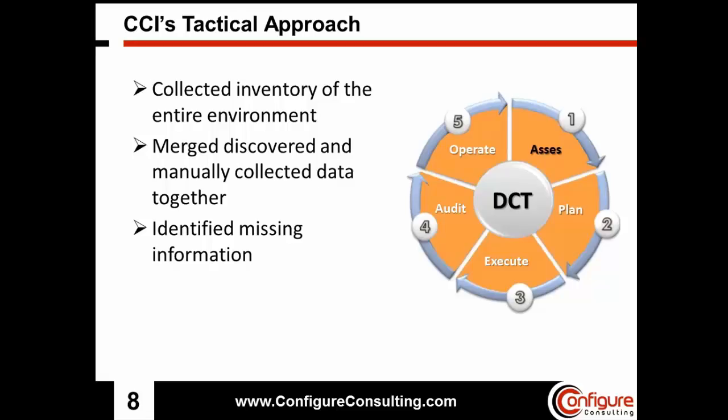So I mentioned at the beginning that they originally tried their approach using their service desk and the data that was within there. By the time we completed our discovery, between 20 and 25% of what we pulled back was not included in their initial reports.